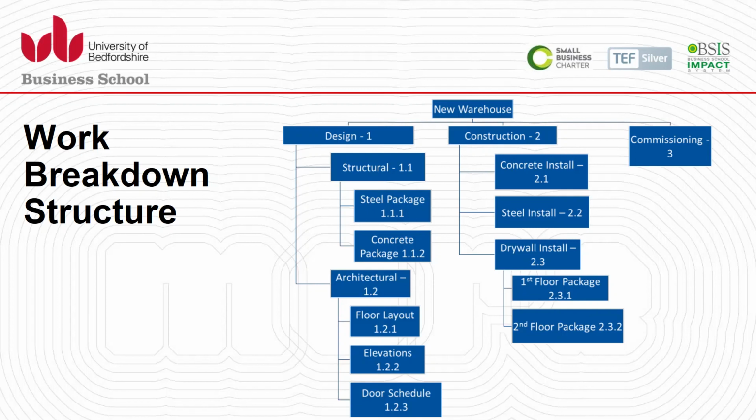If the work, or the project, is being decomposed, not as it is going to be delivered, but by what the different elements of the product are. For example, in this example here, if you want a new warehouse, we need to decompose the work, starting with a design phase. That is the first important work to be done as a key deliverable.